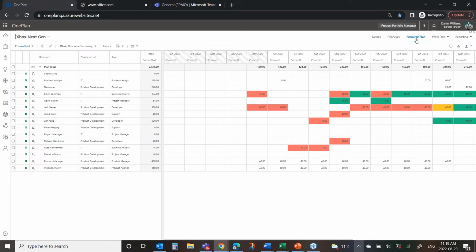What we also want to know is, we're going to work on this product and take it to market. When do we need resources, and what resources do we need? So we can leverage our resource planning capabilities in our tool to map out the types of roles we need, the quantity of those roles, in some cases maybe the named individuals that need to be a part of this overall product delivery exercise. So that we have that visibility and can understand how the demands of this product map against all the other products in our organization and the other work that we're trying to do, to understand where we may have resource bottlenecks. And you can see just based on the color coding here where we may have some challenges, and we're going to have to navigate and work through those.